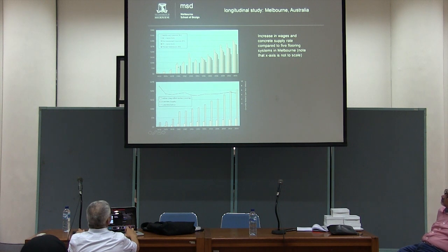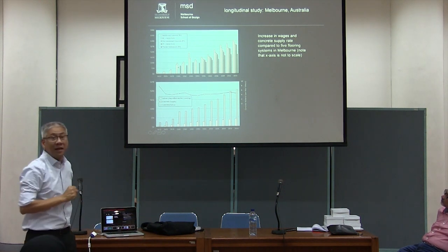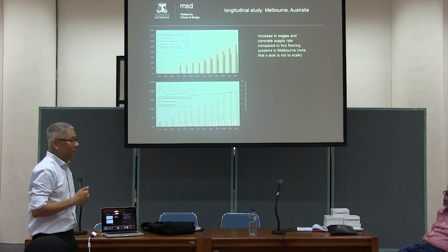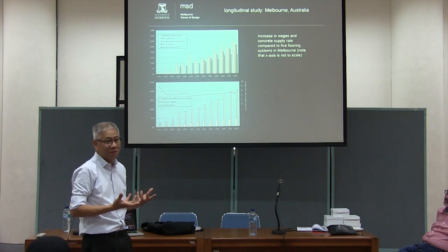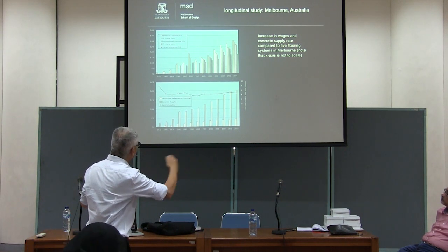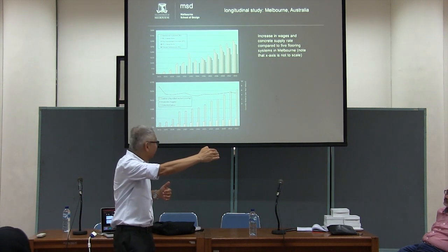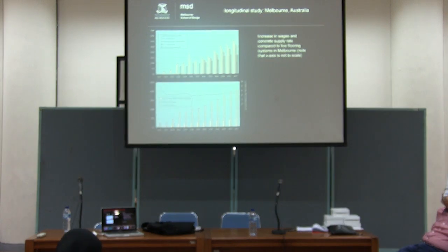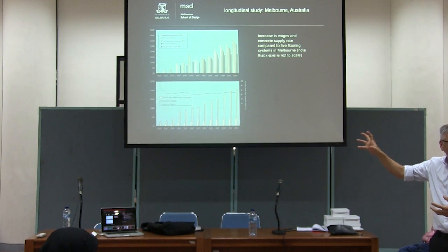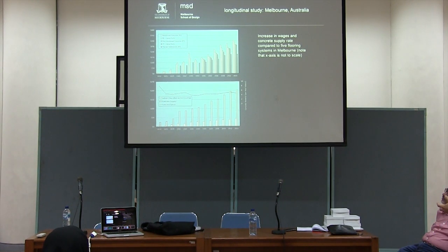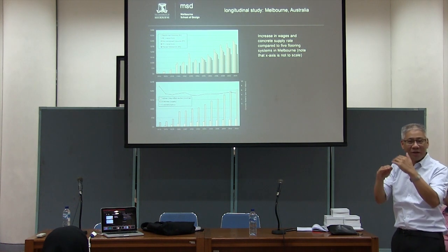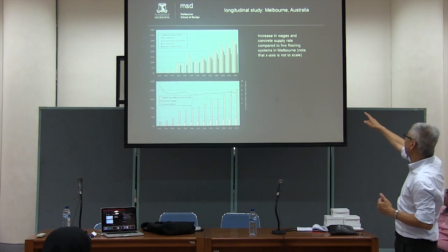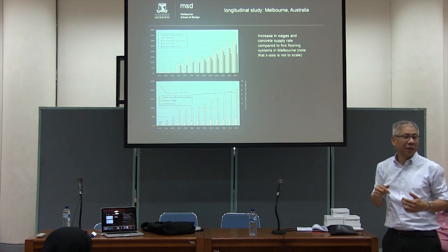Now you can see that when metal formwork first came out, it was more expensive. So when new technologies come out, they're more expensive. You have to wait until your labor cost goes up before it changes. I should move over here so that you can see. So this gives you an example over time of how things change. So when your labor cost exceeds a certain number, technology changes. So all of a sudden, metal formwork becomes cheaper.